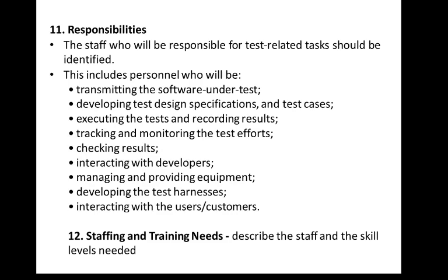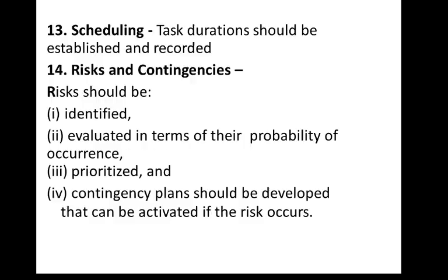The test planner should describe the staff and skill level needed to carry out the test related responsibilities, such as those listed in the previous section. Any training required to perform tasks would be noted. Next component, scheduling. Schedule task durations should be established and recorded with the aid of a task networking tool. Milestones should be established, recorded and scheduled. These milestones usually appear in the project plan as well as the test plan.